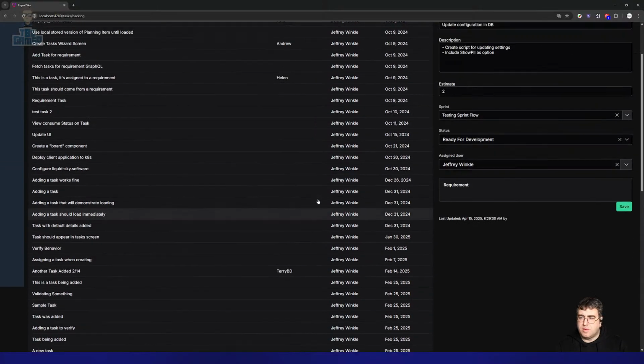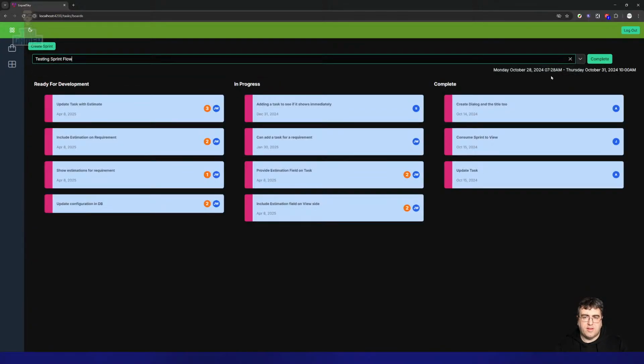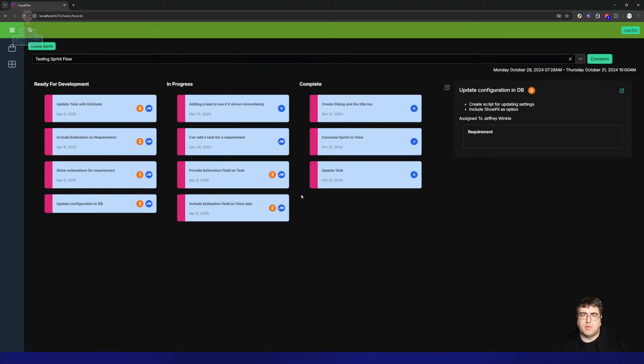As of right now, I fully intend to never let you change an estimate during the sprint. Right? An estimate should be an estimate. An estimate should not be something you mess with. An estimate should be an estimation of the effort involved, and it can't be an estimate if you're allowed to change it. So from a review perspective, once you go into the sprint, once you start that work, the idea would be you cannot change the estimate.